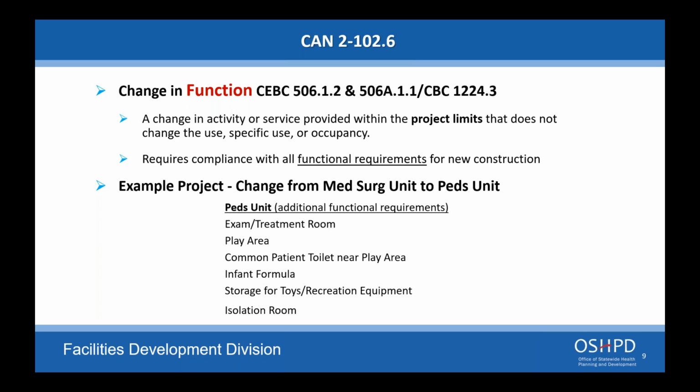If during a repair project, such as water intrusion, an existing non-compliant condition is discovered, such as PVC above the ceiling, does a facility need to address the non-compliant condition? If it's existing non-compliant, they do need to address it. Again, if you're doing a repair project, is it part of the repair? It would need to be replaced.